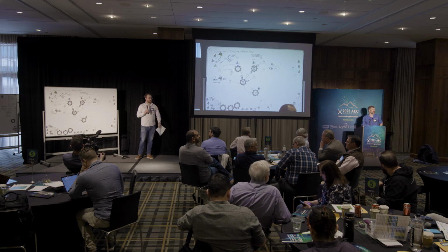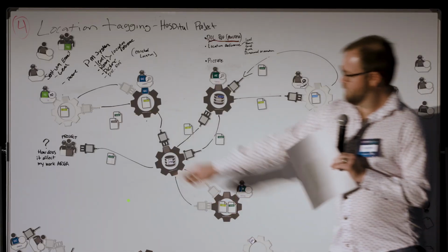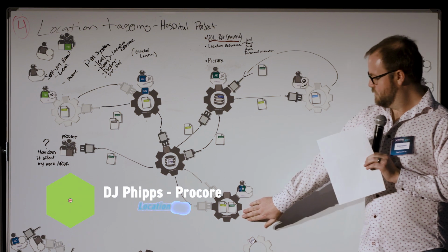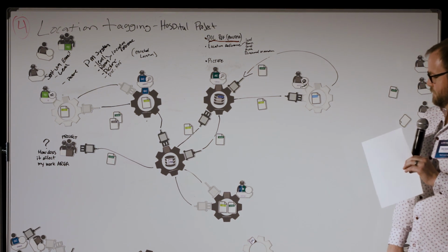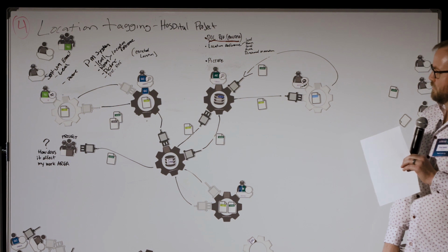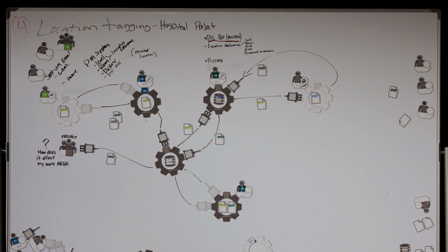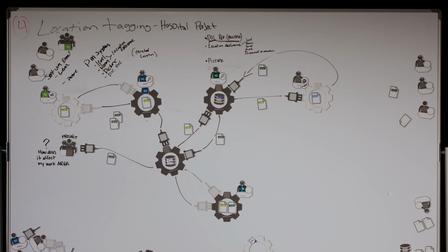That last distribution, right, going back to the original trade who wrote it. But the one down below is, the RFI gets blasted to everybody on the project. Now, everyone else involved in the project has to decipher that location and what impact it has on them and their potential for the work there. So that's where we talked about trying to translate location as it goes through. It comes back. They have to figure out, does that impact me? What kind of effect does it have on walls, ceilings, MEP systems, everything else that's associated with that.